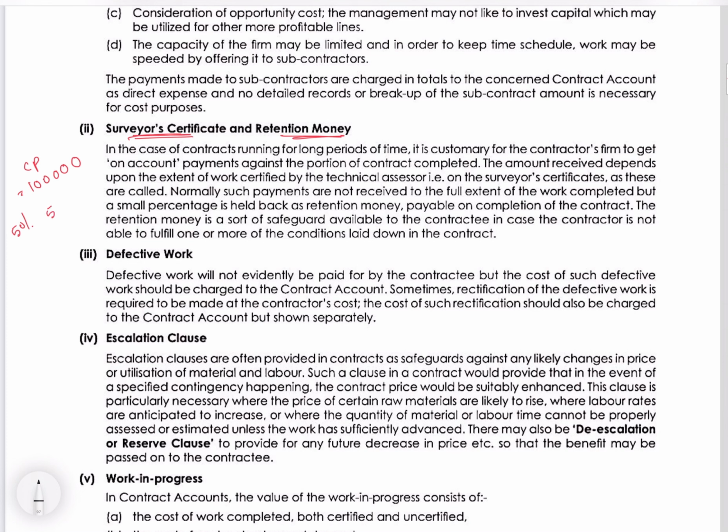So on that basis, actually 50,000 he should pay, but he will not pay the full 50,000. What he may do is keep some amount aside and give some amount as a token. So if he had always planned that 10% he will keep back and only the remaining amount he will give. So in the 50,000, 10% means 5,000 he will keep aside, and only the remaining 45,000 he will pay. Okay, so this 10% he will keep aside, as this is a cover for him.